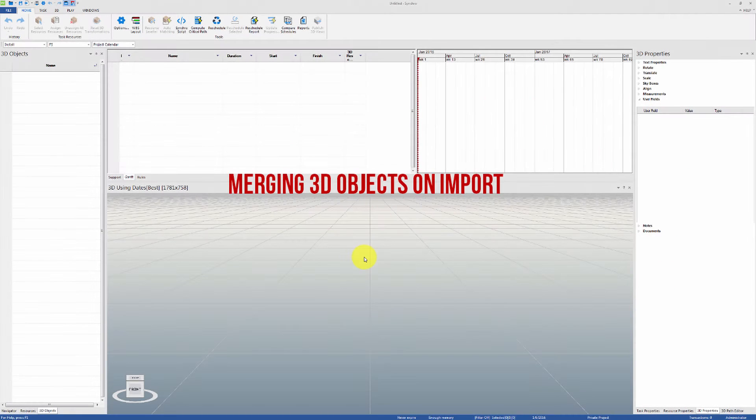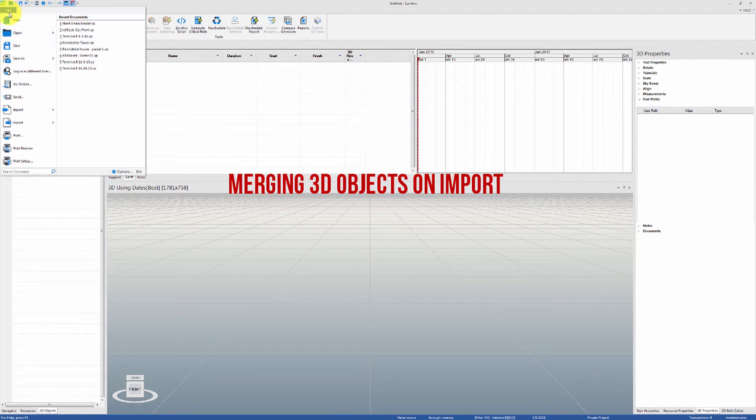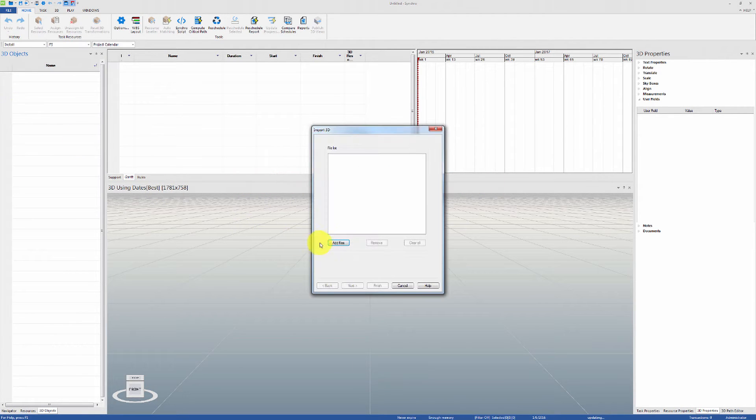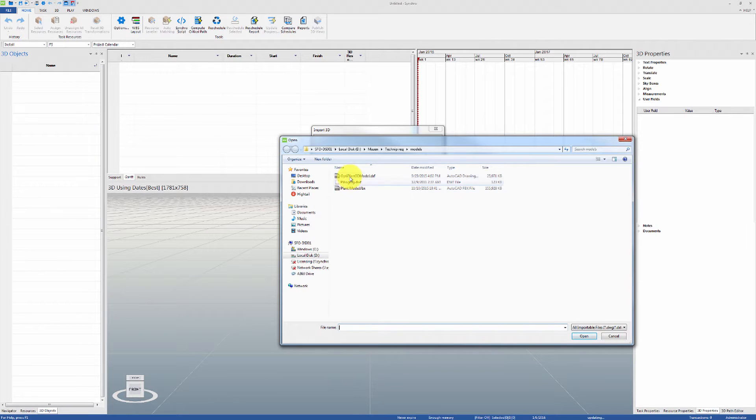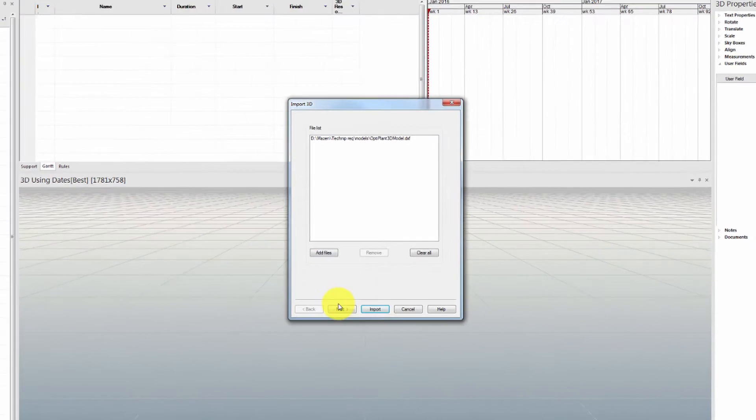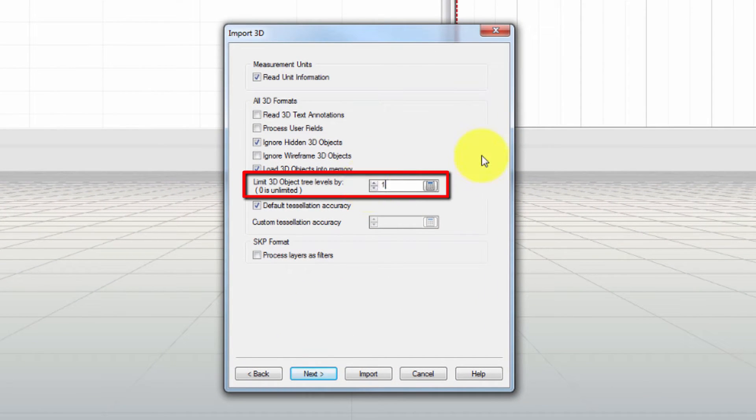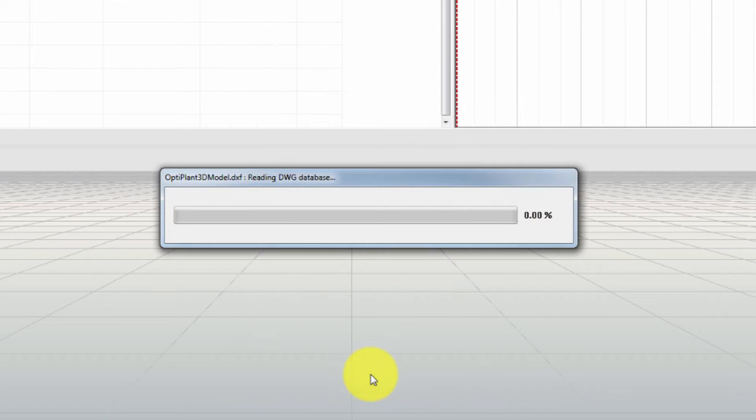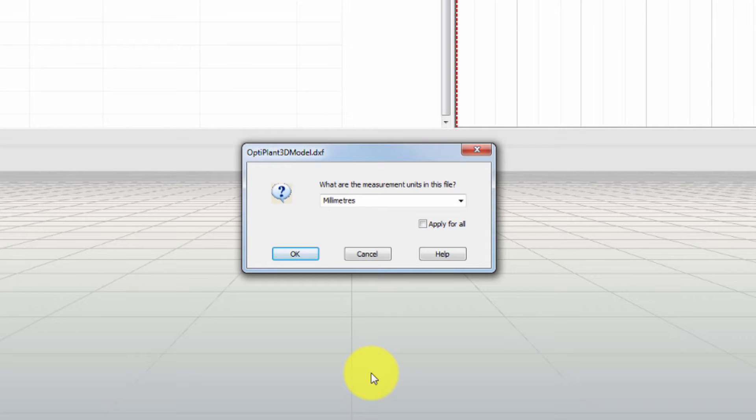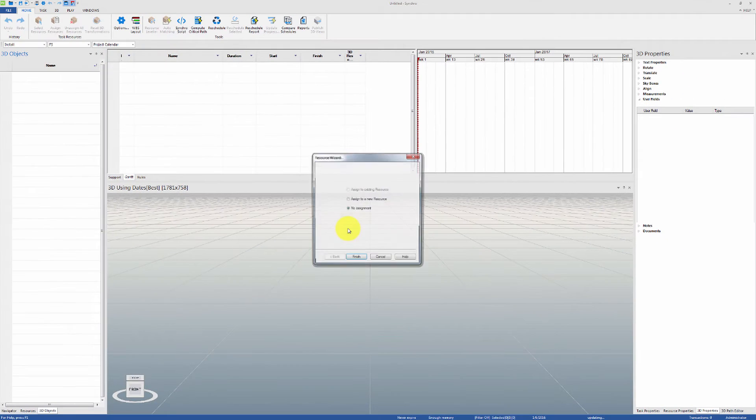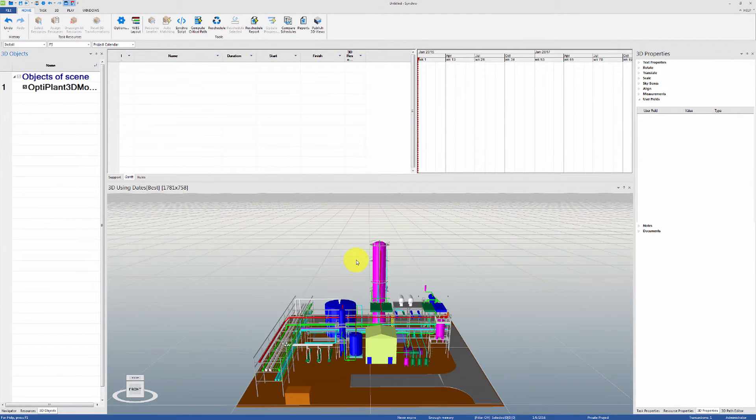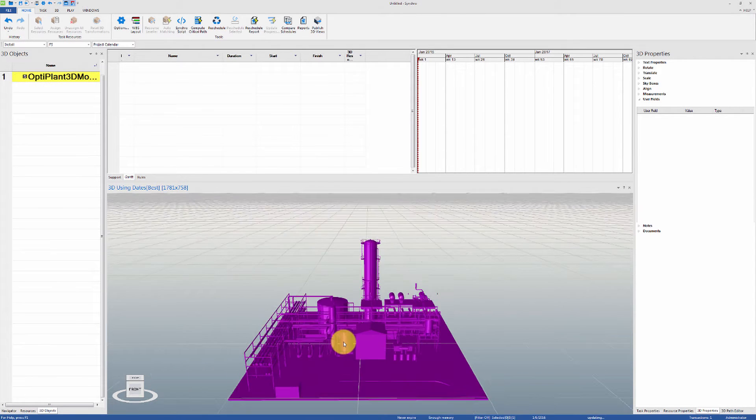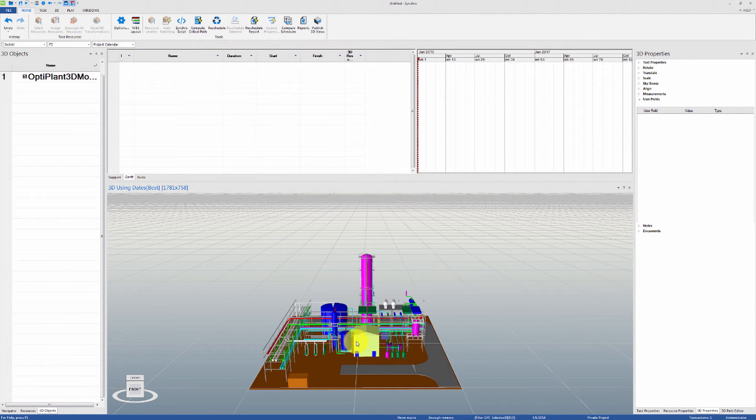The fastest way to merge 3D objects is to limit the 3D object tree levels on import. For example, let's import a basic gas plant model and set the limiting value to 1. Because we set the limiting value to one level, you will notice that the entire plant model was imported as a single 3D object.